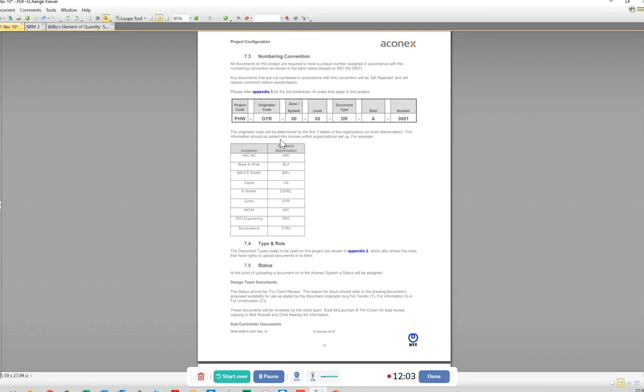You have certain companies that don't do that, as we will have in this project, where you just send your submittals to the document controller from the main contractor, and he puts your document into a workflow, and when it comes back, he sends it back to you. So every company has a different way they want to configure their project through their electronic database management system.